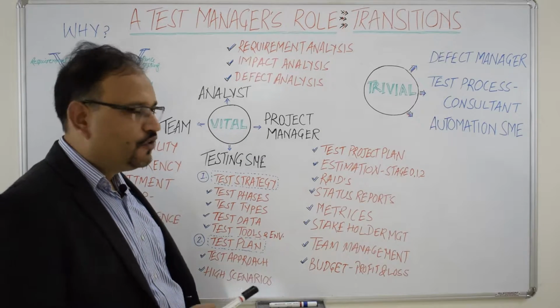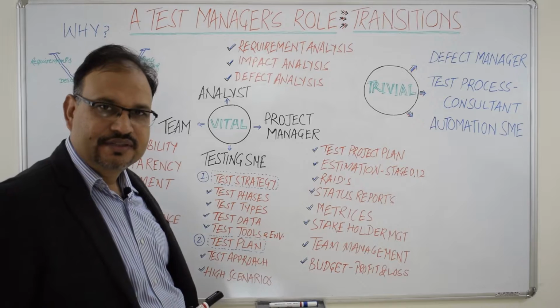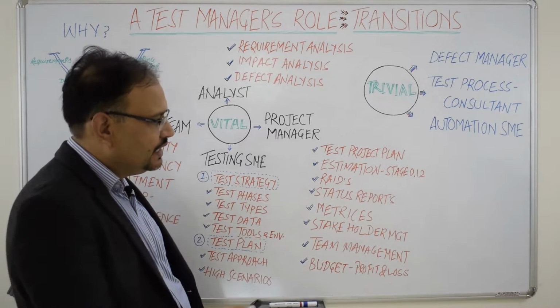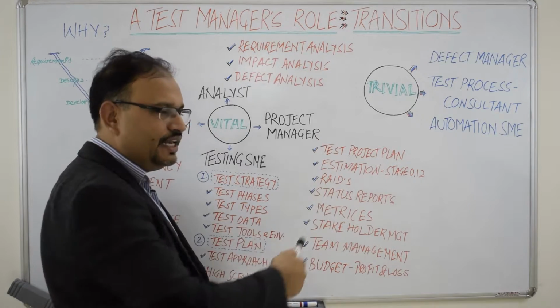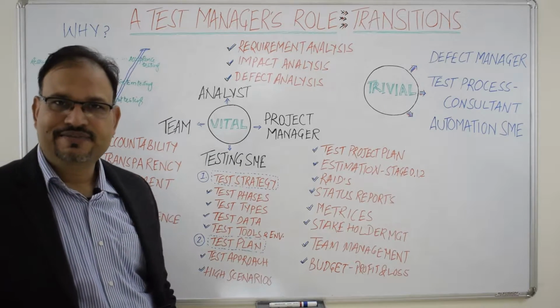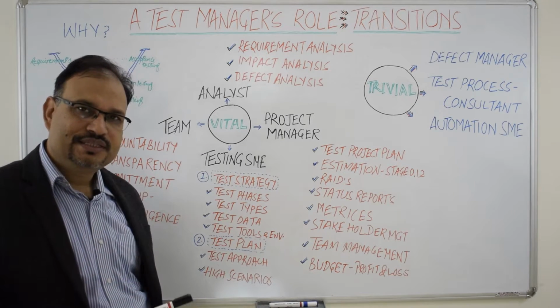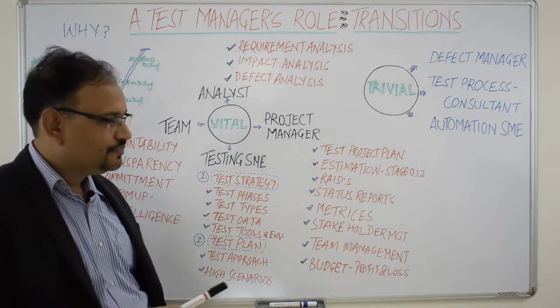The second such role for him is that of project manager. He is a manager for the testing activities. Like a normal project manager, he'll be coming up with a project plan in MPP or Excel sheet, clearly outlining the software testing lifecycle phases, milestones, activities, resources, their cost, and the critical paths.